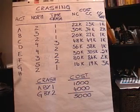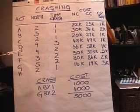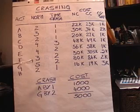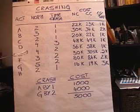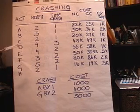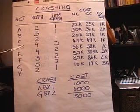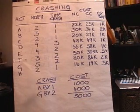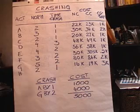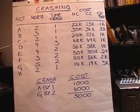How do you speed up some activities? The way to do it is to throw resources at it — perhaps hire some workers to work at night, bring in more equipment, or hire more workers in general. Do whatever it takes: add resources to it, which of course costs money, and reduce the project time.